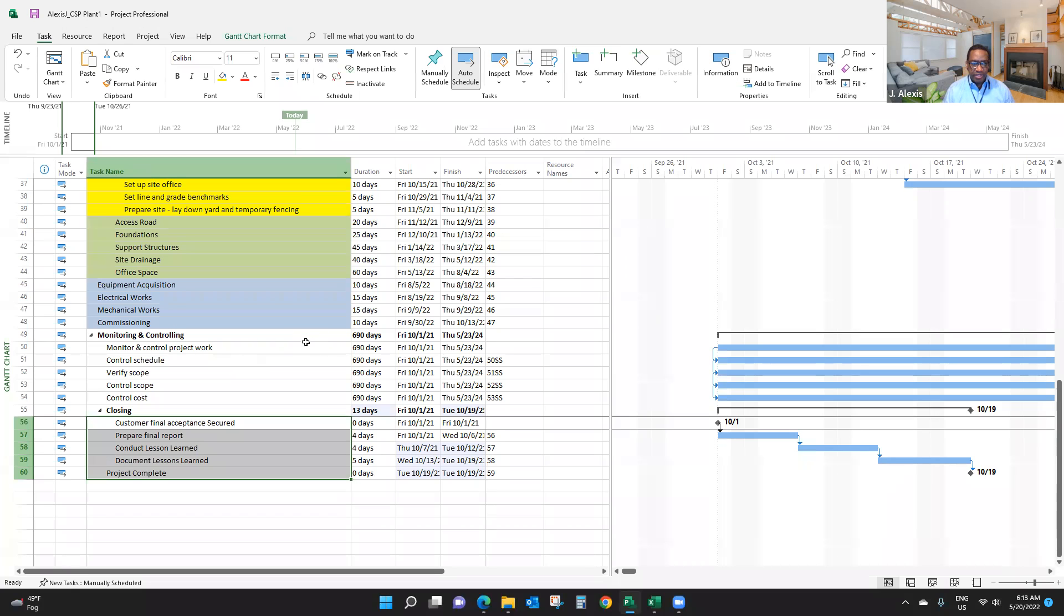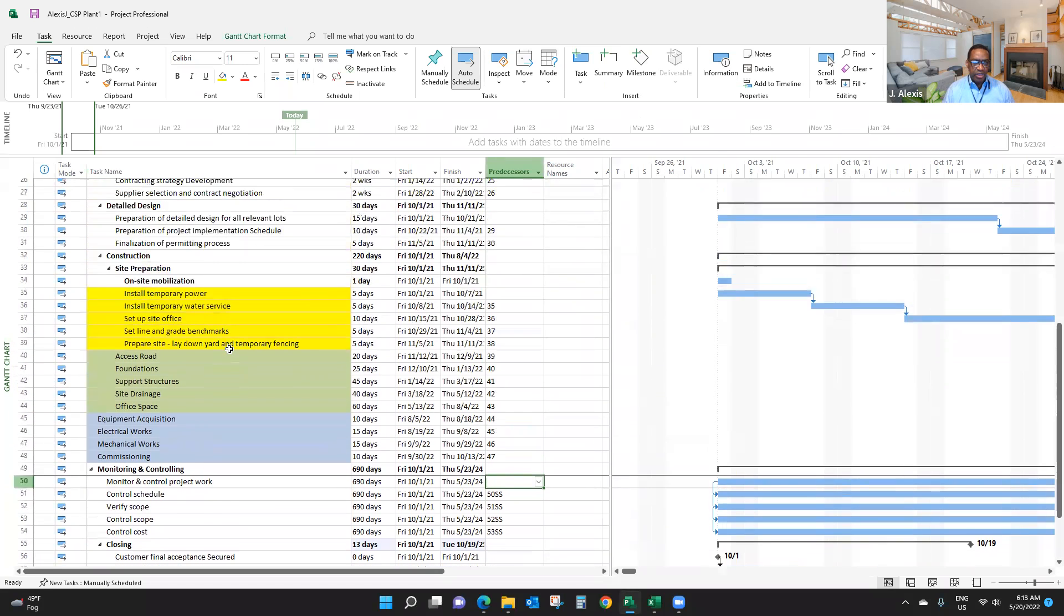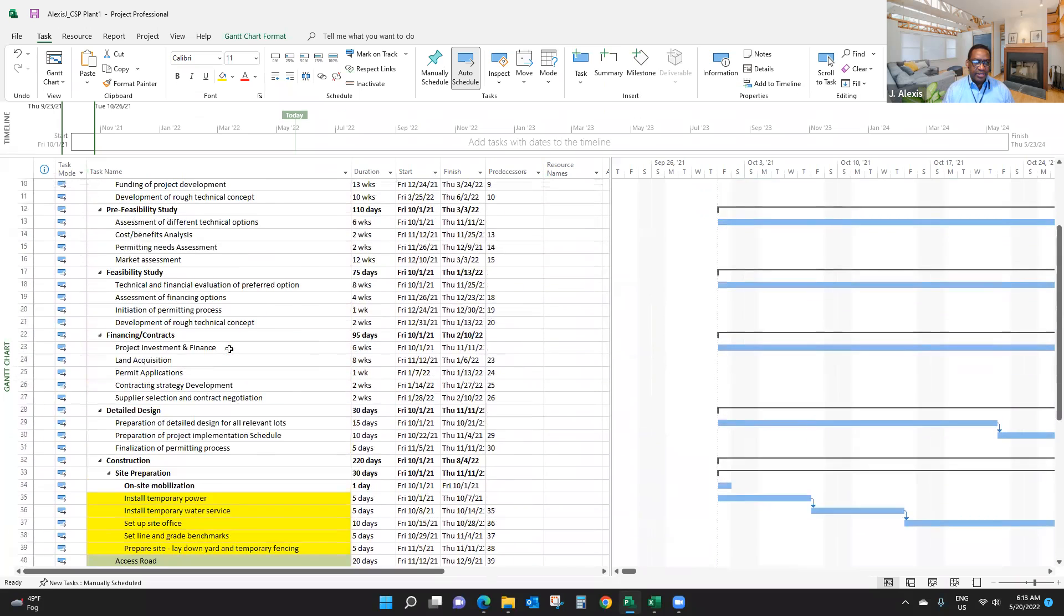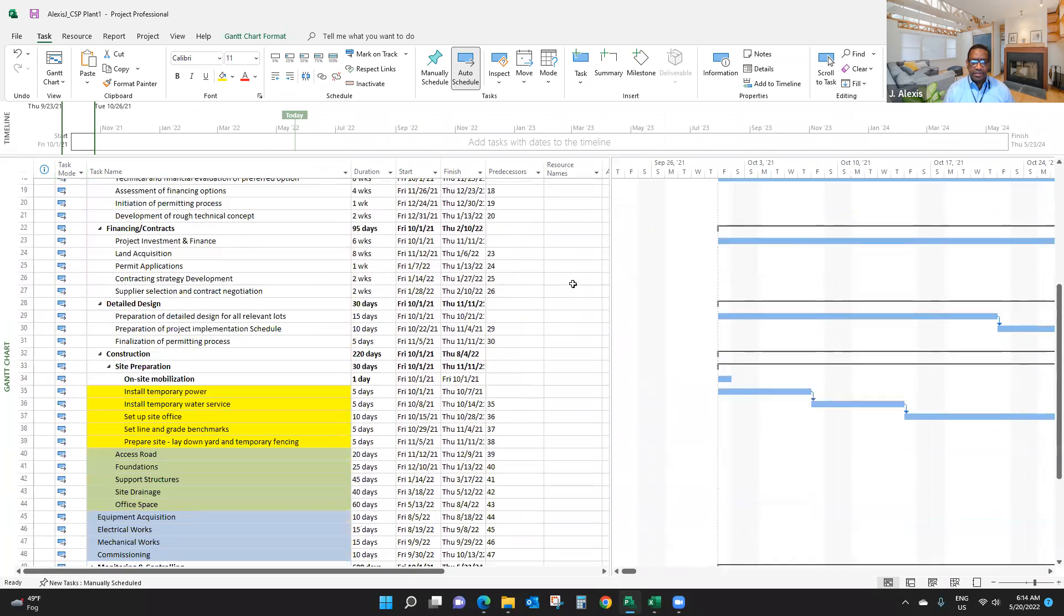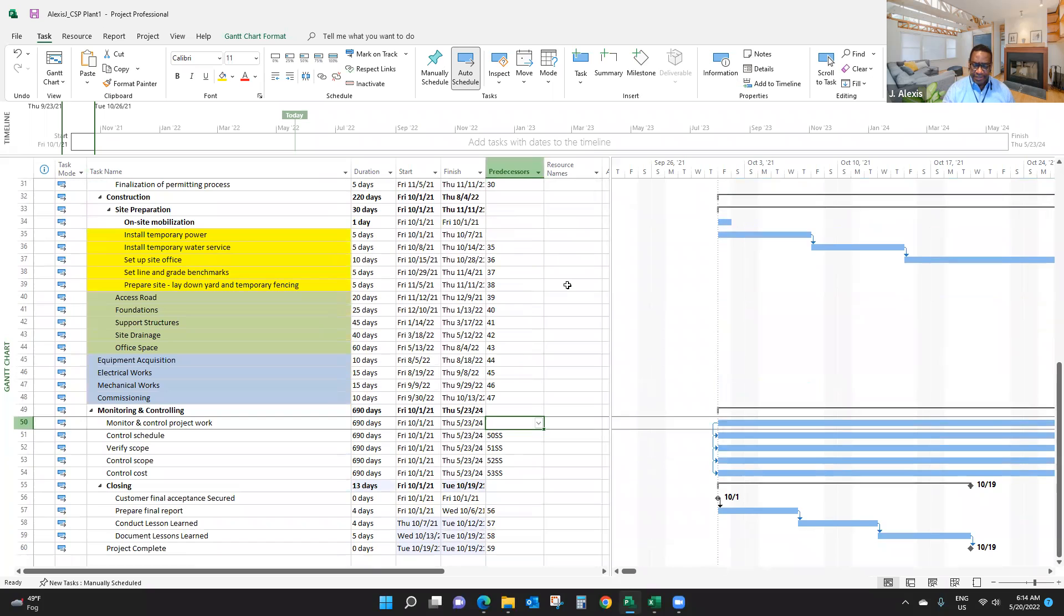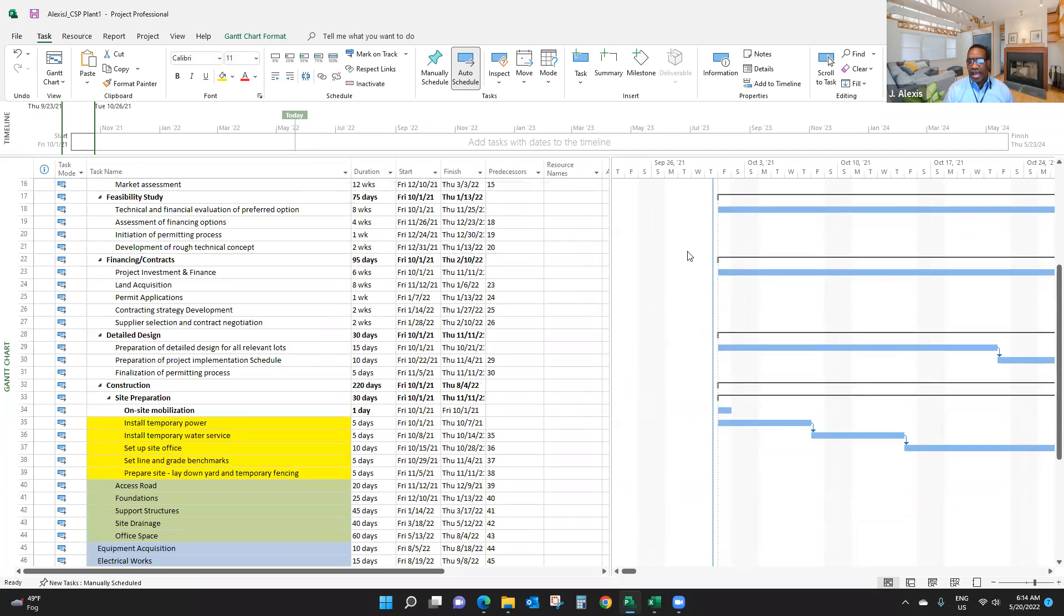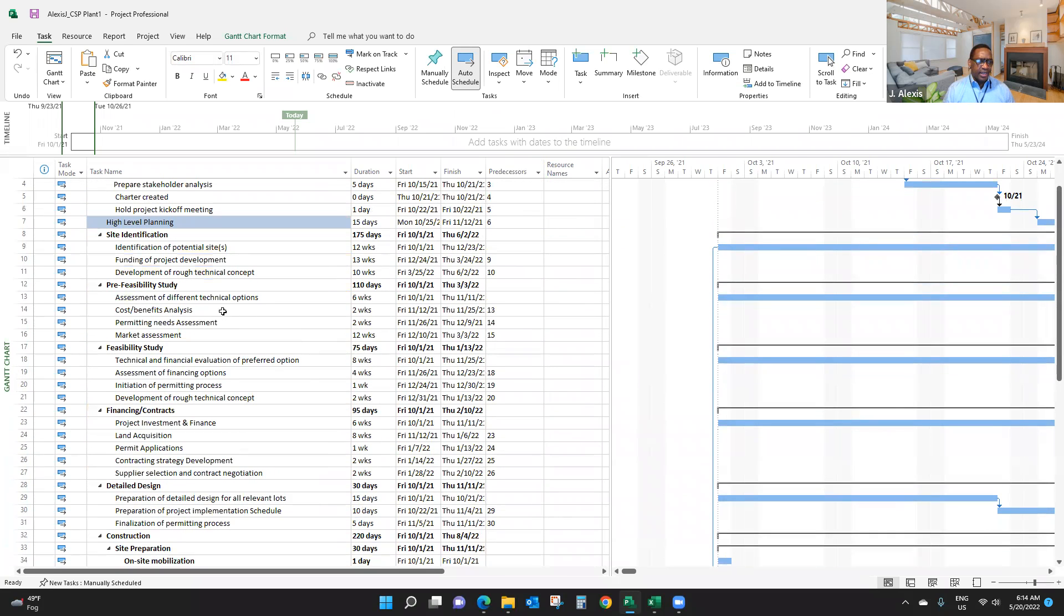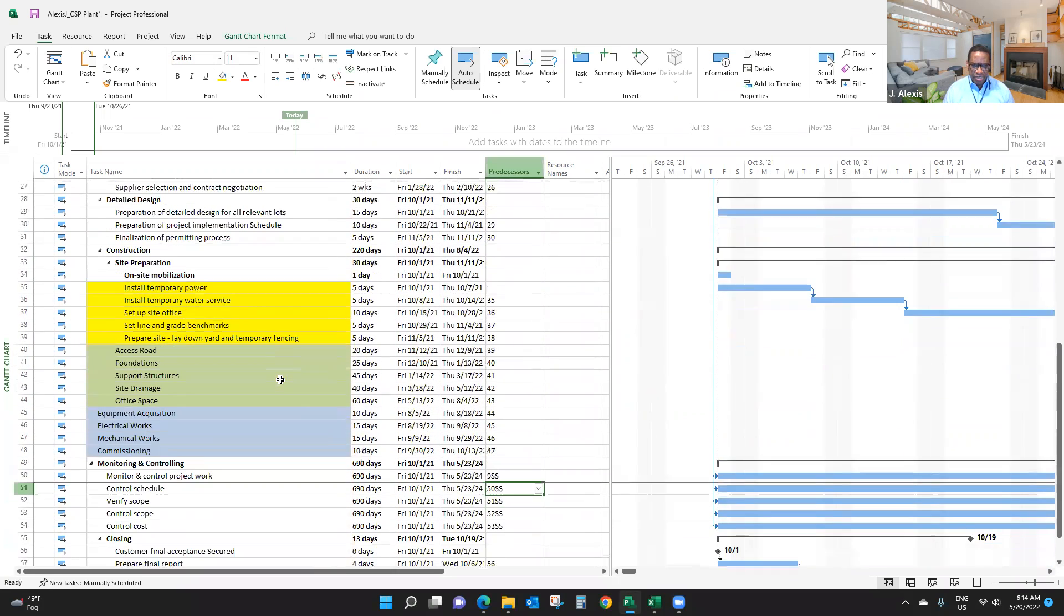I'm going to give you an example here. I can say monitoring and controlling project work can start as soon as I start with identification of potential site. That could be 9 SS. Do you see that? Start-to-start, right? So here, monitoring and controlling will be what we call a hammock activity, encompassing different parts of project execution, which makes perfect sense because I start monitoring and controlling when I start the execution phase of my project.